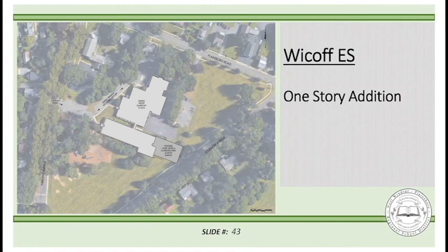Why is this a good area to design? You don't impact the parking lot, you do not impact the current playground, and you do not impact the current ball fields. It's the easiest location to build with the least disruption to the building.